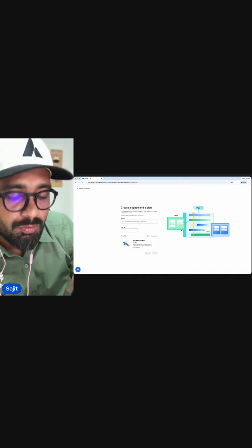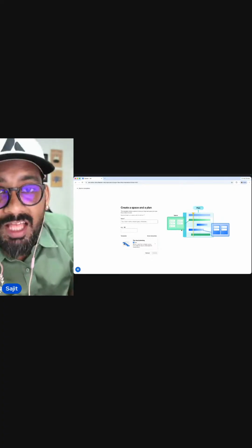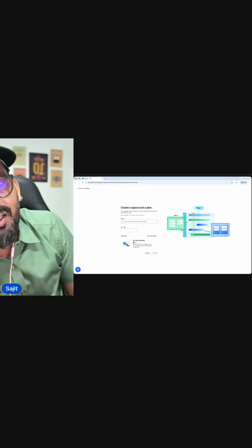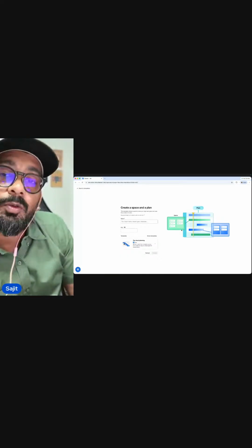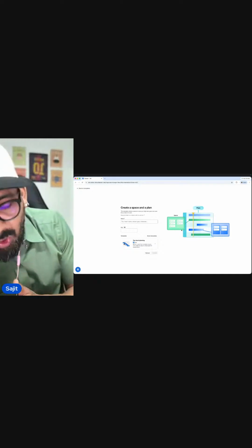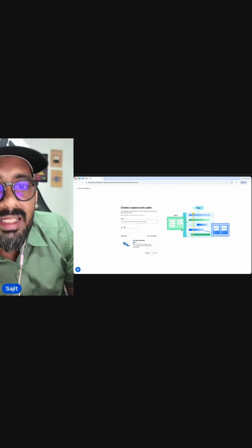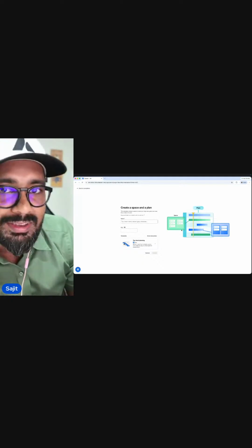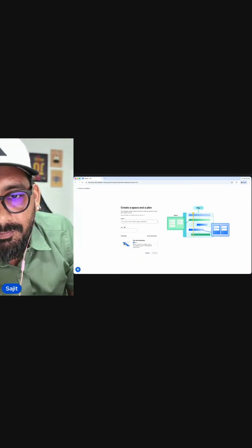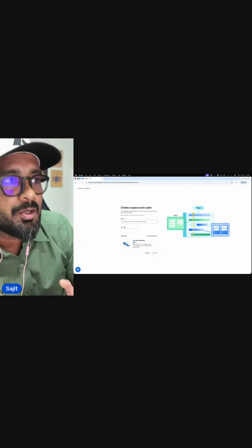You can plan out scenarios. You can say, all right, if one of my team members went on leave and this task doesn't happen on time, what will happen in a best case, worst case scenario? So that's actually a really good tool now at where it is, and with Rovo it's getting better each day. So that's about the advanced roadmaps.